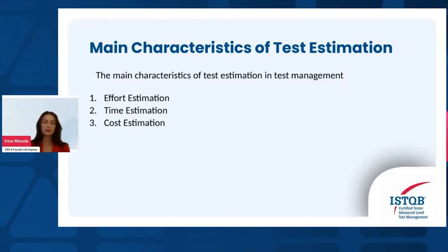The second important characteristic of test estimation is time estimation. Time is a critical resource in any project. Estimating time involves calculating both calendar days and working days to ensure that the testing fits within the project milestones. For example, if testing needs to be completed within 3 months, we need to consider holidays, weekends, and other non-working days.